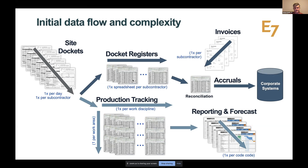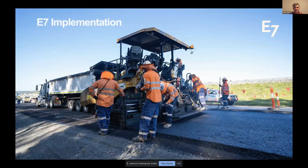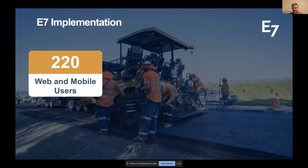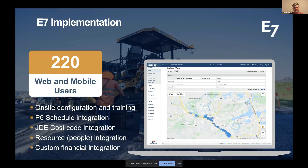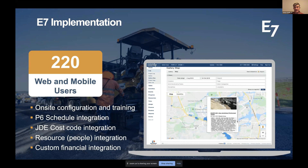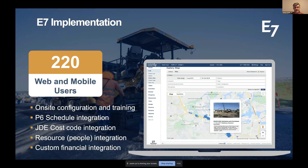When we came to the project, the first thing we did was configure the system and set up users. We now have around 220 web and mobile users on that project. Configuration involved a combination of on-site and remote training, integration of the P6 schedule, JDE cost codes, the HR system via API, and custom financial integrations — allowing all users to capture data and visualize it as the basis for daily data-driven decision making.